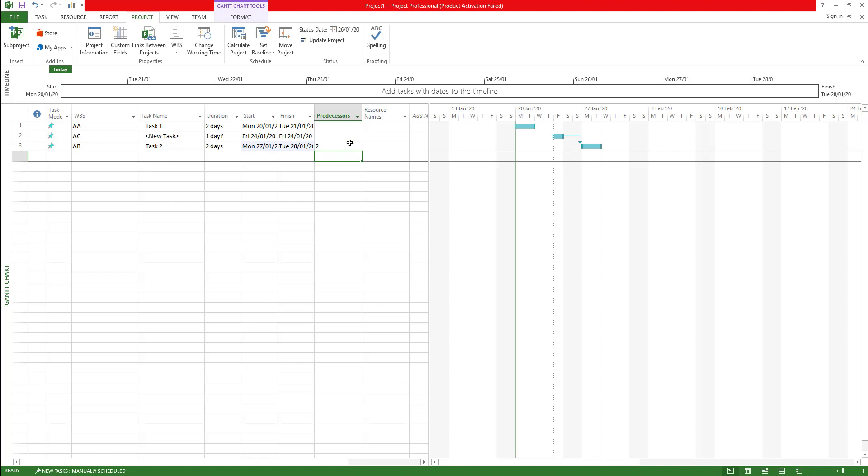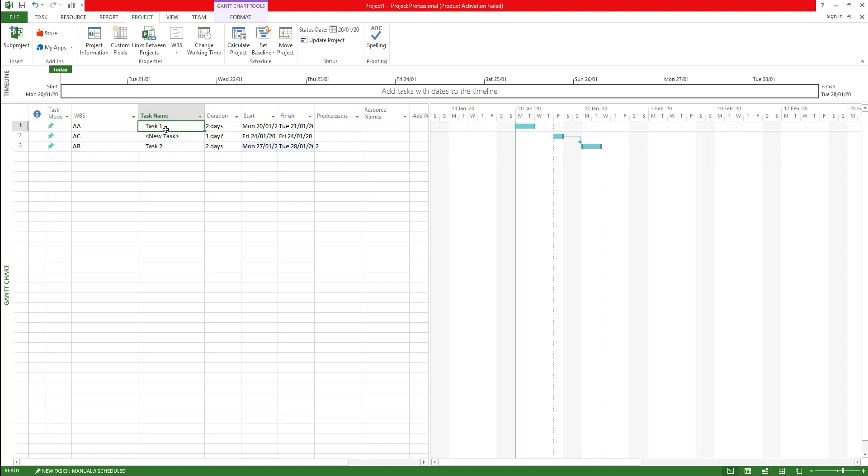The third element is resources. Resources can be human resource, material, and cost resource. There are three types of resources that you can add into Microsoft Project. The fourth one is assignment of resources. That means for this task which person is going to work and what sort of materials are needed to complete the task. So those are called resources. These are the basic elements which is considered as work breakdown structure, and the code that is linking these things together is work breakdown structure code.